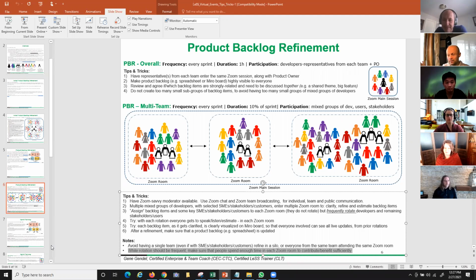And then you just look at these numbers. This round of estimation, these people gave us this number initially. In the end, does it really matter whether we have a bunch of 8s and a bunch of 13s? We're talking about 50, 60 people oscillating between the 8 and the 5, or 5 to 8. It assumes that we're somewhere within the range of understanding. Since we're not chasing the number, we're not chasing the metric, it should be sufficient.